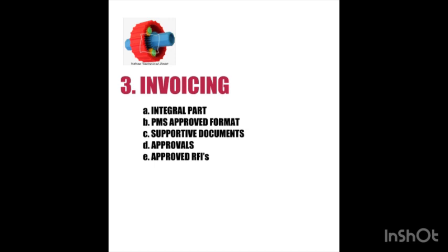While claiming progress, all supporting documents signed by the site consultant are needed. If a site consultant is available in your project, you have to get your progress approved by the consultant, or else by the project manager, and it should be attached as supporting documents. RFI can be attached as supporting documents. RFI means request for inspection, and that approved sheet is required.